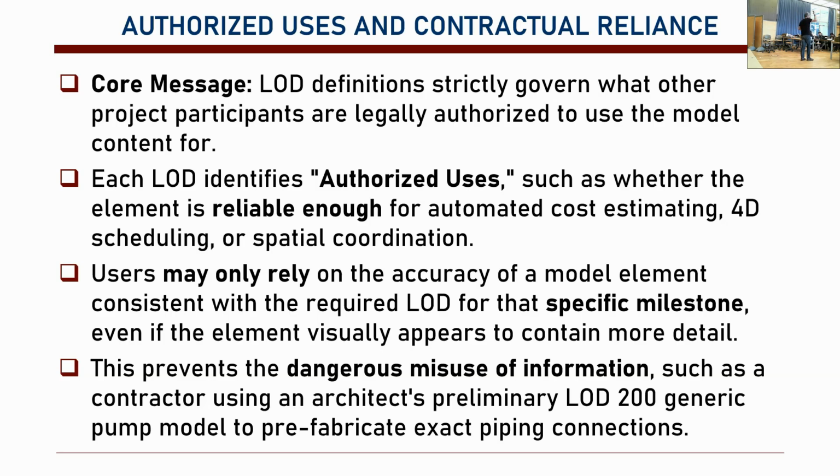For that milestone, if we have LOD 200, we cannot base our construction process on that milestone. We should wait. We cannot start making decisions about construction. We should wait for the correct milestone, which is LOD maybe 400. Okay? So, this means that there is no dangerous misuse of information.